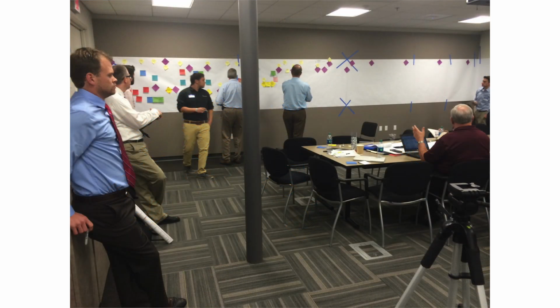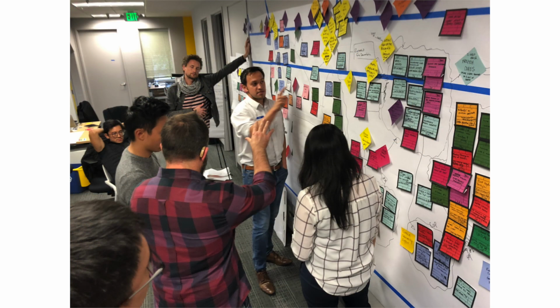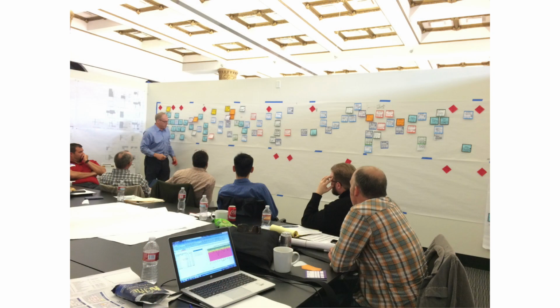Now, to start off, just putting some post-its on the wall isn't a pull plan. There's a structure to how one's set up, how it's created and read. Each time a pull plan is created, there's a certain scope that's being planned between design or construction milestones. Most critical path method, or CPM, scheduling software used diamonds as milestones, and so you'll often see post-its turned 45 degrees to represent these milestones. We'll add M for milestone.